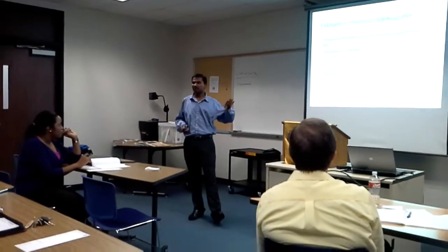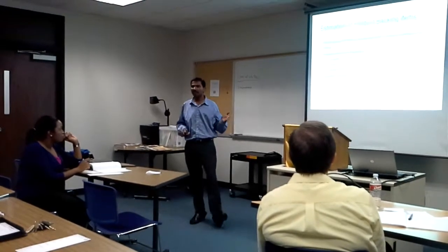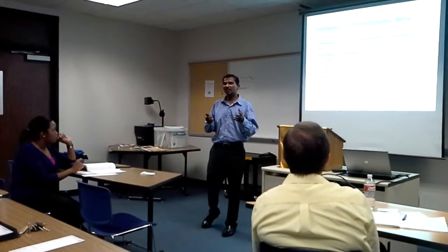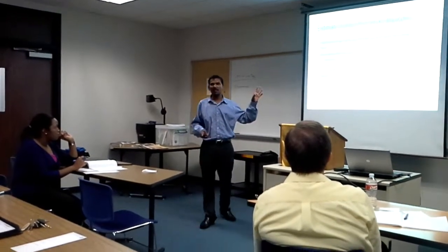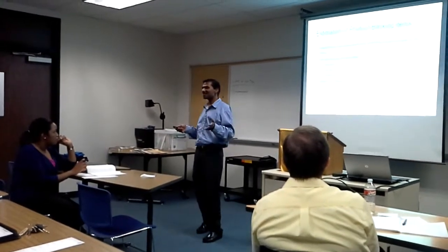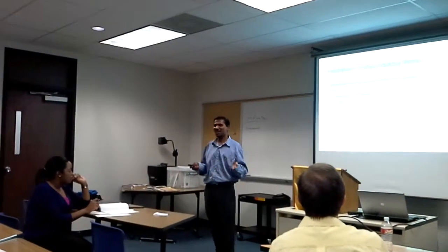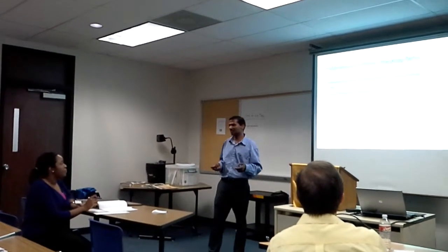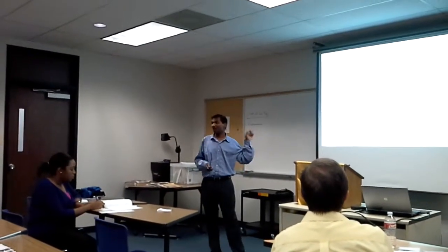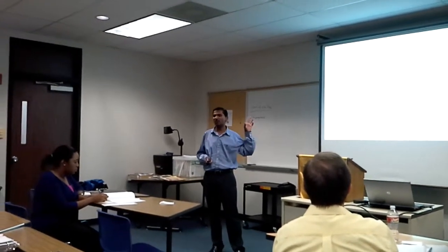This is usually done for regular project management. How you do the technique is basically you speak with the expert, either within the team, and ask about the task, typically how long it is going to take, or we use the traditional project management technique and create a work breakdown structure. It's a standard way of doing project estimation. The estimate is only a forecast. It's not exactly accurate, it's only a forecast.